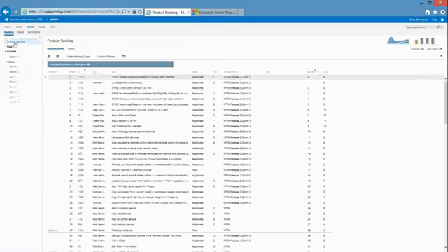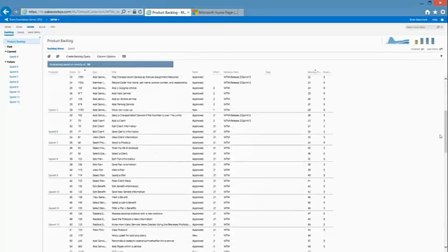Sure. This is a new tool set in 2012. For those at home, there's a little bar in the top center there that says forecast based on velocity. And velocity is kind of our expectation of what we think we can deliver this week. At Oakwood, we like to work velocity into the concept of story points from an Agile perspective, but that could be the man hours you have that week, or it could be the number of flamingos you can fit in a room. It really doesn't matter. As long as you can map that number back to the way you rank a user story or a requirement or feature or anything else.